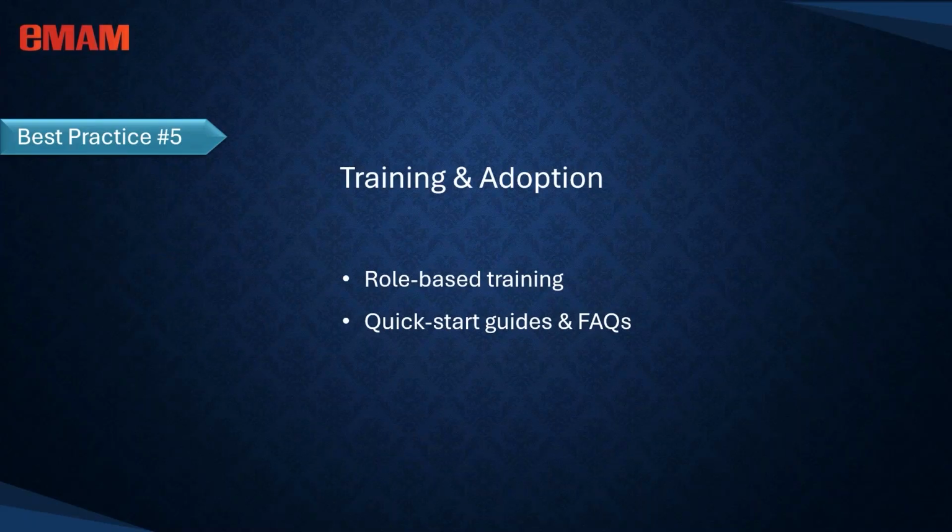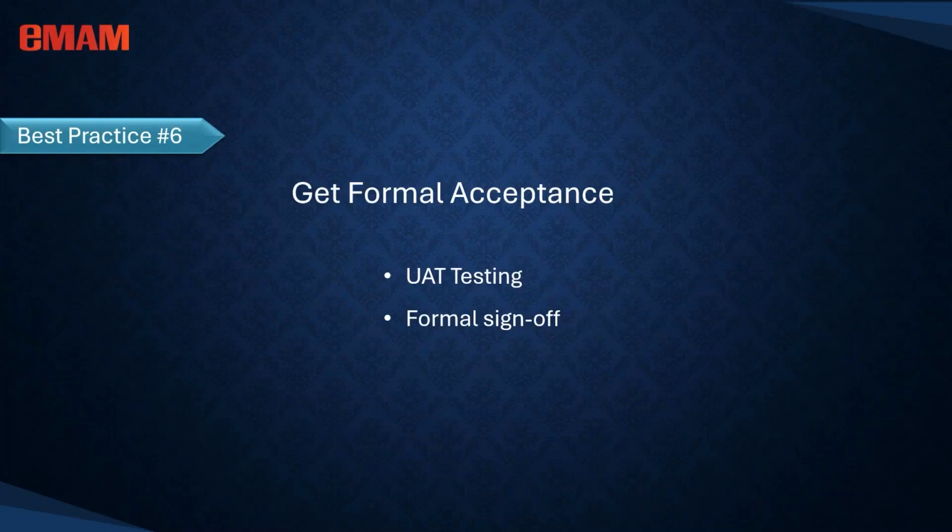And the final one is getting a formal acceptance. Why it matters? It ensures that the solution meets business requirements and avoids disputes later. Conduct a user acceptance testing. Engage end users to validate the functionality against the real world scenario. Resolve issues before sign off.